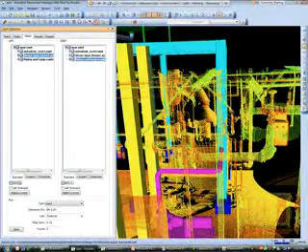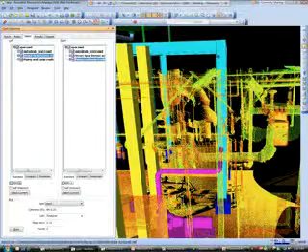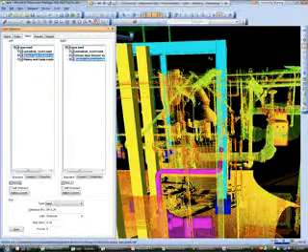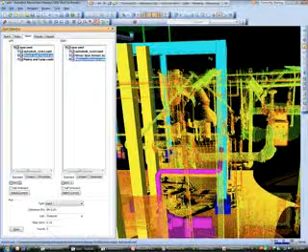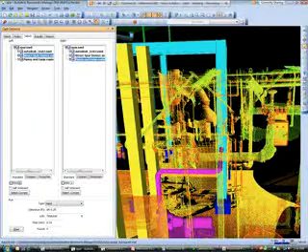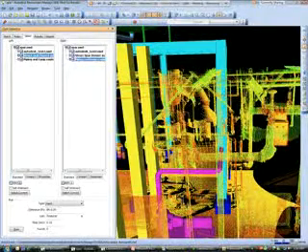Now, looking at it from equipment as well as building materials, the nice thing about this is with Navisworks, we can bring in other information and have that be representative of trades. So I could bring in a generic volume that might represent the footprint or the outline of the area that, let's say, a plumber would work in. I can also do the same for the electrician. And using the same process of linking over, I can create work packages as a schedule and make sure that the electrician and the plumber aren't going to be working in the same area.